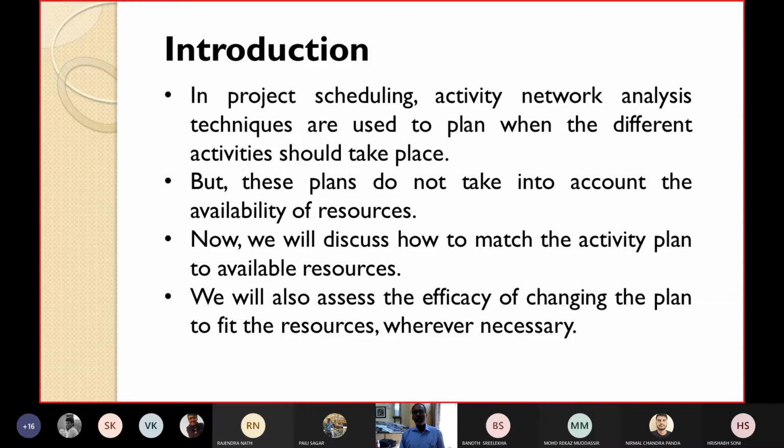These activity plans do not take into account the availability of the resources. They assume that an infinite number of resources are available, with no constraint on the resources, but in practice resources are limited. So how to allocate these limited resources to the activities when they are required, that is the subject matter of today, known as resource scheduling.